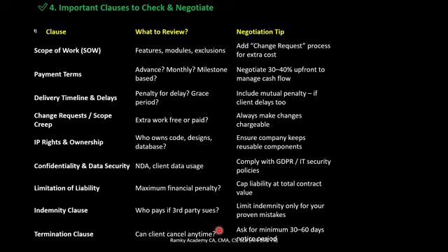So in these kinds of clauses, we have to include either termination for cause or termination for convenience. Certain times, the supplier wants to terminate the contract. The supplier has the right to get the payment up to the date they delivered the services as per the contract. At the same time, if the customer wants to terminate the contract for convenience, he has the liability to pay all the payments up to the date of delivery as per the requirement of the contract termination.